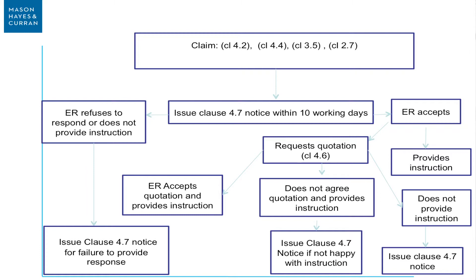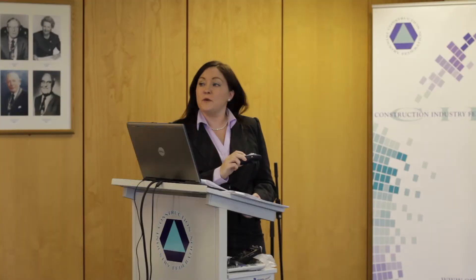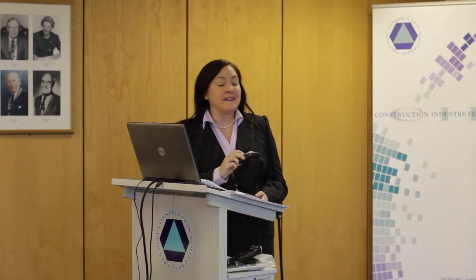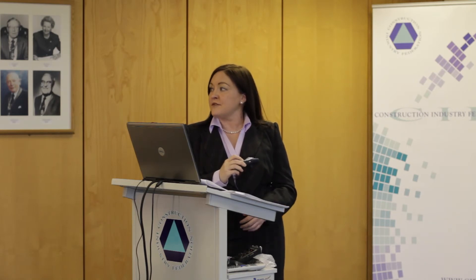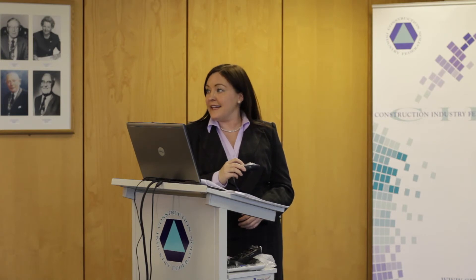What people don't appreciate is you can't just say 'he didn't do anything or he didn't give it to me.' No, that's a claim - issue a 4.7 notice. This is simply another letter within another 10 days. If you asked for an instruction within 7 days and 7 days pass without getting it, then within 10 days of that write another letter. Because as I said earlier, it's a compensation event if you've asked for an instruction and haven't got it. Be clever, write the letter.